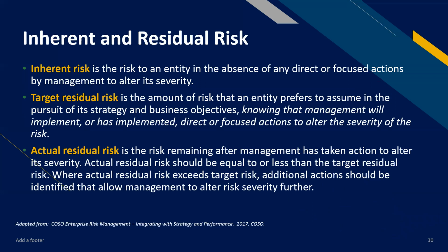Now, we define inherent and residual risks. Okay. Inherent risk is the severity of the risk absent any direct or focused action plans. Okay? That's what inherent risk is. So what we did earlier in the risk assessment is called inherent risk assessment. Right? Because we didn't consider what our risk response is. Okay? Because supposedly, if this is the risk, and it is this severe, okay?